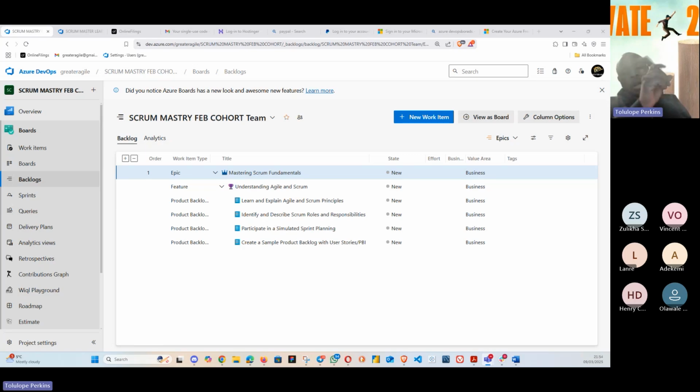We have our daily Scrum, our sprint planning, I think retrospective too has been time boxed, and then also the review. The only thing that has fixed time is our sprint itself. The sprint that covers the whole thing has a fixed time. If you have chosen 2 weeks, that means it has to be 2 weeks.